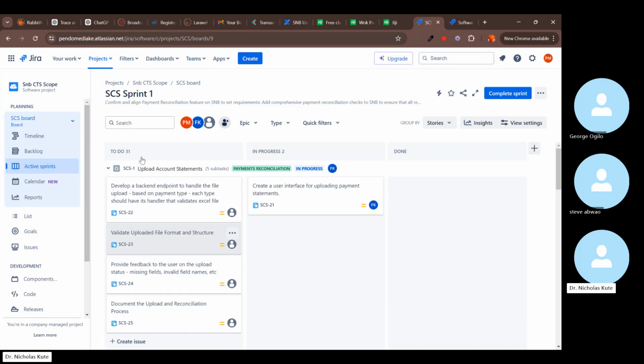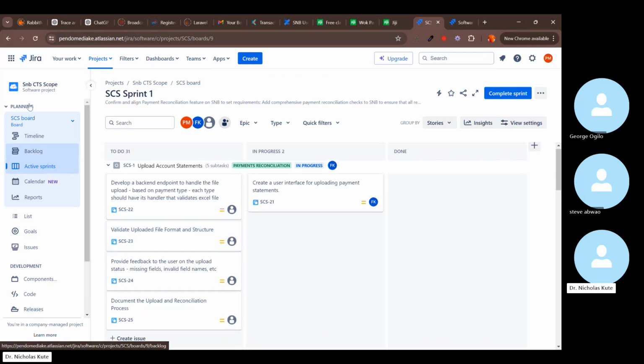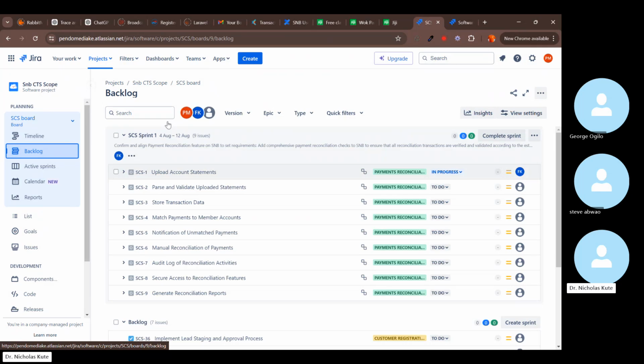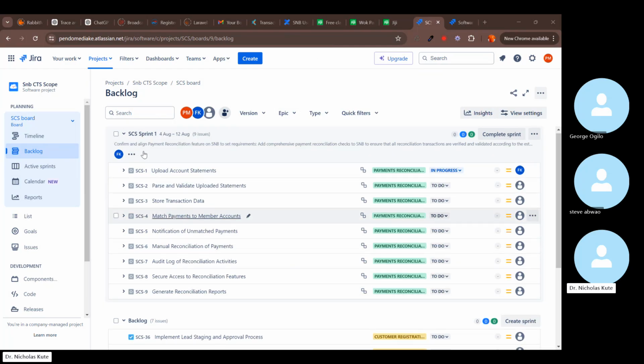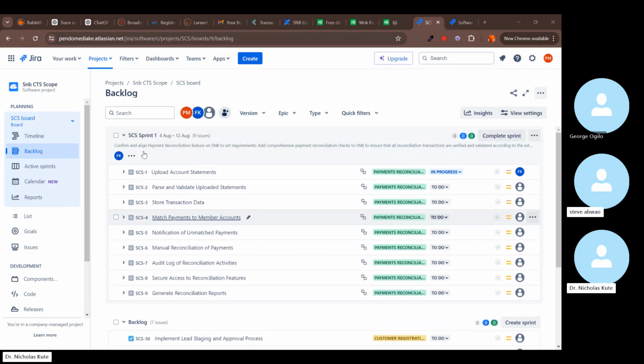Okay, so in the backlog for this project, normally we store our stories in epics. So epics is the overarching parent classification of the stories. You have an epic, and then under that epic you add the different items to be done in that epic. So if it's the roles one, like the one you're saying, just a moment. Just see.